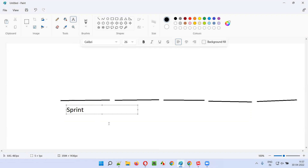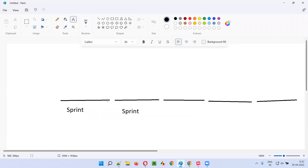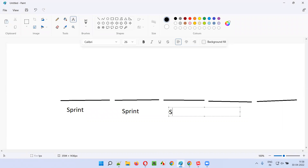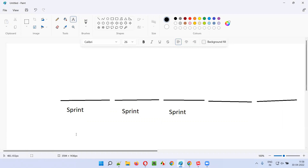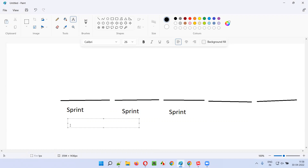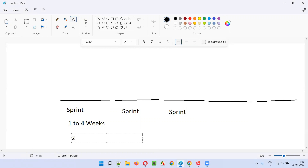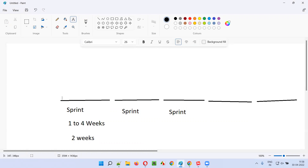Each iteration - iteration one - is known as a sprint. Some set of work will be completed by the end of the sprint. Each and every iteration is a sprint, and sprint is time bound - it will have a duration of one to four weeks. Most of the projects follow two weeks, that is 10 working days. In those 10 working days, the work assigned to the sprint needs to be completed by the end of the sprint.